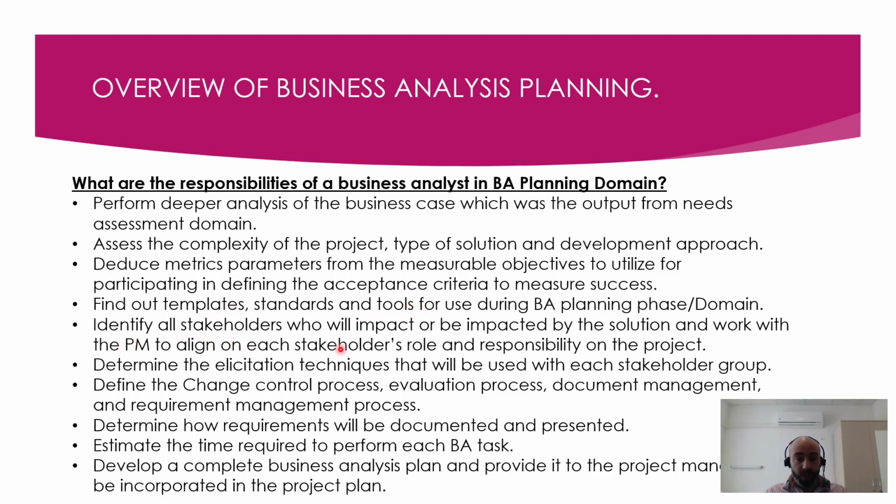Identify all stakeholders who will impact or be impacted by the solution and work with the PM to align on each stakeholder's role and responsibility on the project. Remember, identify all stakeholders and analyze these stakeholders. Okay? We are not saying identify all key stakeholders or identify key stakeholders. We are saying identify all the stakeholders. So in needs assessment, we identify key stakeholders. In planning, we identify and analyze all the stakeholders.